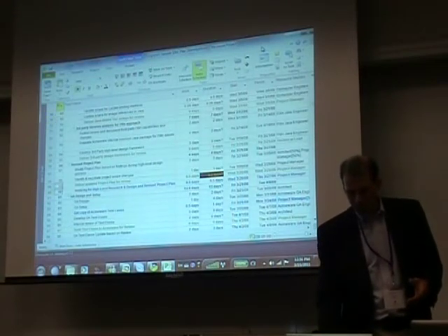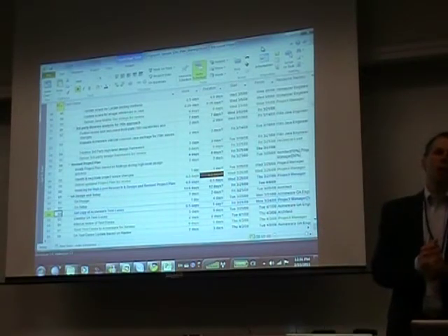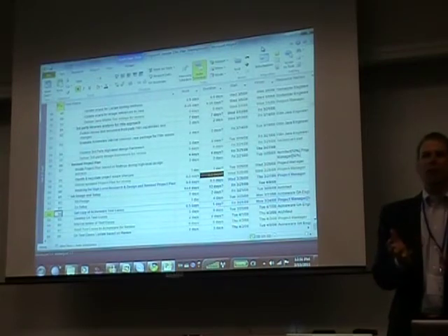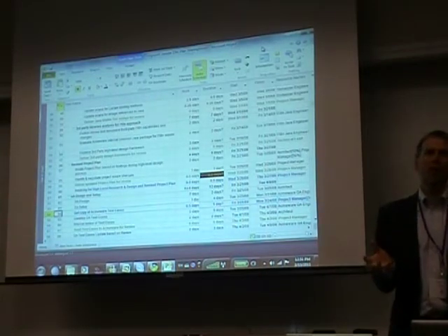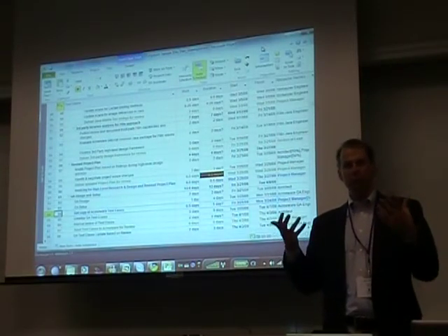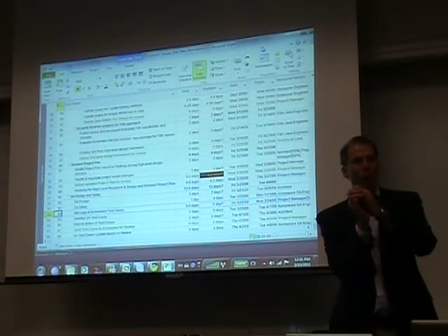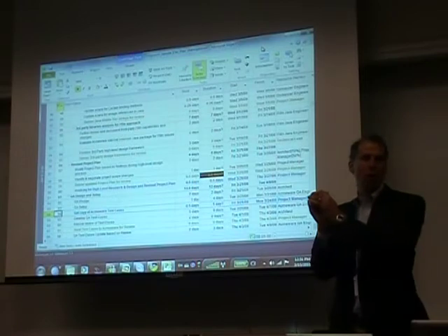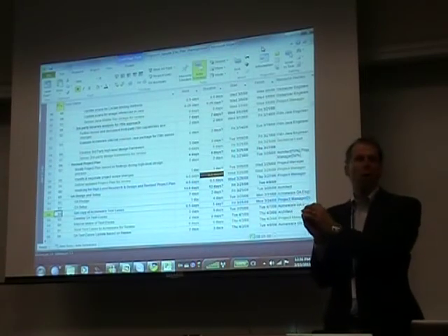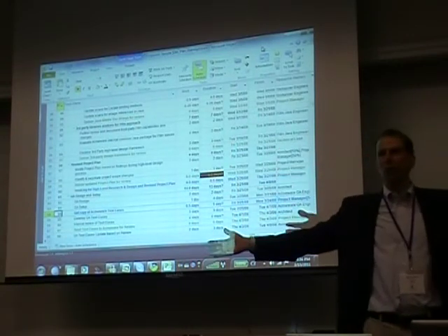The other thing is you want to build your QA into the process. Generally, what happens with internationalization is the testing is going to be rather large scale, as opposed to adding a feature or an agile release where you have a 3-week sprint and you can just test this one small area. You have either a whole lot of small areas and a whole lot of iterations and a whole bunch of product backlog, or in this case we're doing a waterfall, we have to test across the whole product.